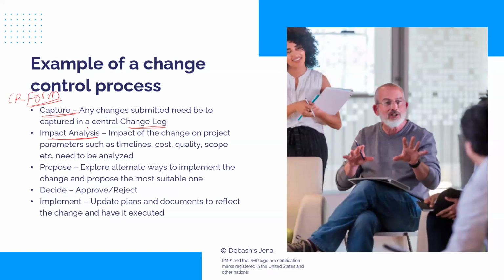Then the next step, impact analysis. We had been talking about this. So whenever there's a change coming in, we'll do a detailed impact assessment. What impact does it have on time, cost, quality, scope, benefits, all-round impact analysis.